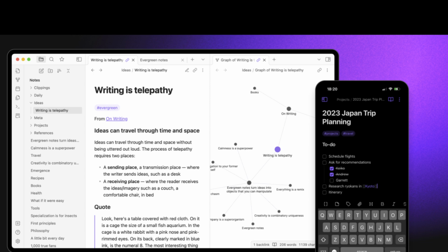So walk me through an example. Say we have a task called Design the Login Page. What would that look like as an Obsidian note? You'd have a note titled Design the Login Page. Inside, you'd specify that it's part of, say, Sprint 1. Maybe it's high priority. The status is to do, and you'd have a detailed description. Maybe something like, design a responsive login page that includes error handling and is consistent with the overall website style guide. Having it all in one place makes it easy for everyone to stay informed and aligned. That's super helpful.